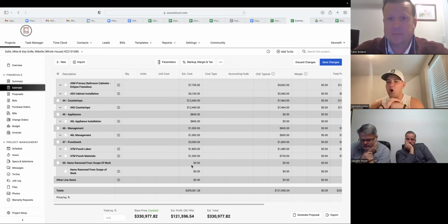And the conversation always comes, I want a 10 by 20 bonus room. Okay, that's going to be $400,000 based on this number. This is roughly the square footage. Oh, well, what if we cut it to 10 by 30? I mean, or whatever, 10 by 15. That always happens. So that allows the client to reduce the scope for you, so that you can still make your money and not have to reduce your price to meet their scope. That happens all the time on the square footage stuff.